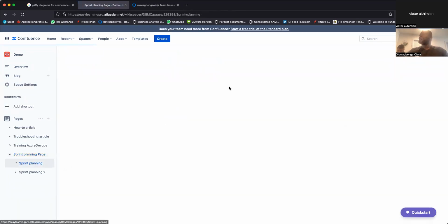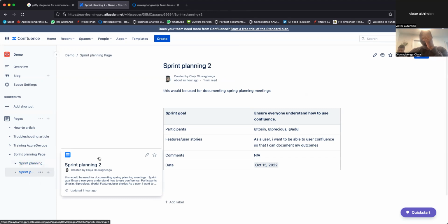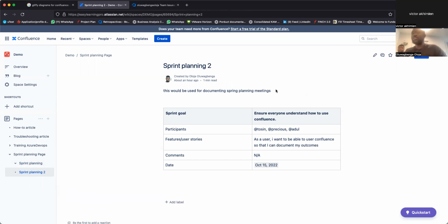So guys, welcome to the sprint planning meeting, right? In this sprint planning, we'll be discussing this prioritized backlog, and we will define our sprint goal, and we'll talk about what we want to achieve in this goal. I think that we should do a 2-week sprint because it will help us inspect and adapt more quickly. We can really see in 10 days what is not working. We can adapt much more quickly than going 3 weeks, 4 weeks, and then things have failed. It takes much more. Remember that Idode will not be happy. He has given us money for this business, and we need to really show value.